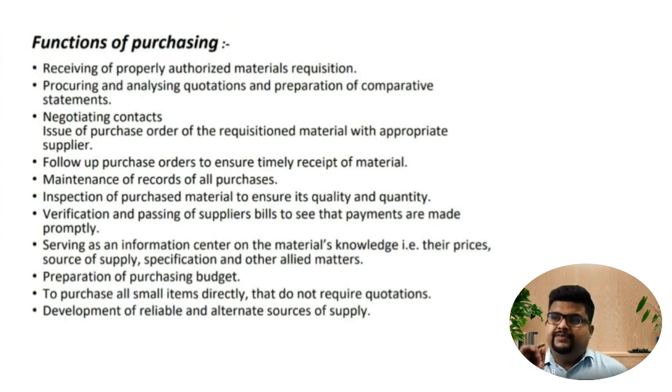So once that requisition is being received, there will be analyzing quotations and preparation of the comparative statement. So once we floated that there is a requirement for XYZ materials supplier and we will be getting the orders for that material from that same vendor, then there should be a certain amount of negotiation to be done. For example, there will be a comparison, there will be a negotiation, and that's the reason the purchasing department is giving you a large amount of benefit, also loss if the work is not properly done. And that's the reason why the purchase department is one of the most vulnerable, most important departments, and they are following these functions.